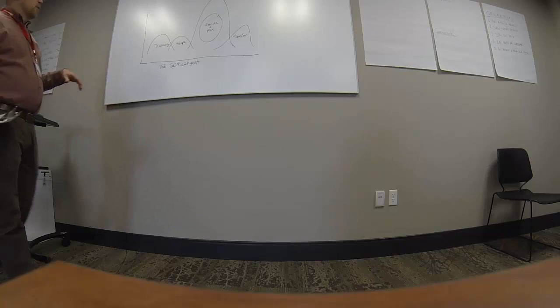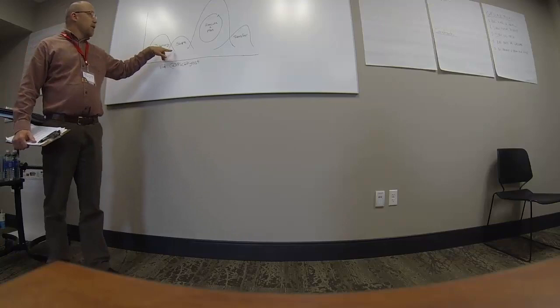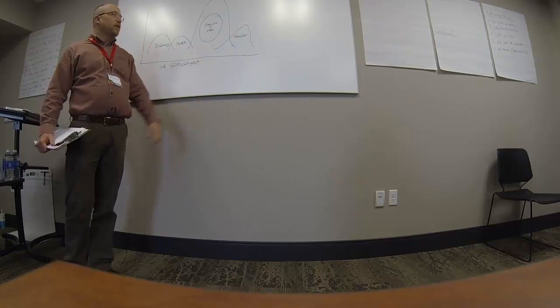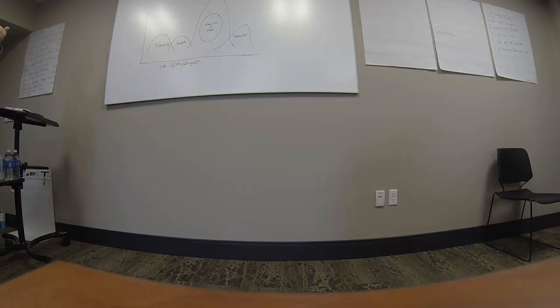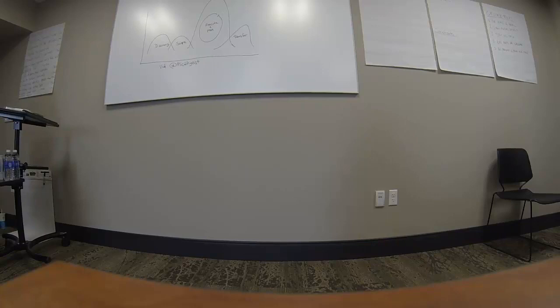What we do is we want to get everyone involved in the project, everyone who wants to see the success of the project, into the room at the same time, to talk about what their vision is and agree on what their vision and priorities are. Because if you don't have that, if you start a project and you talk to the one person who calls you up and says I want something, and you work with them and the end users actually see it for the first time over here, they're going to be like, I can't use this. It doesn't do A, B, and C. I think it's really important to get all the stakeholders in the room at the same time.